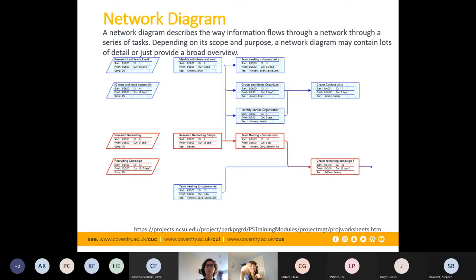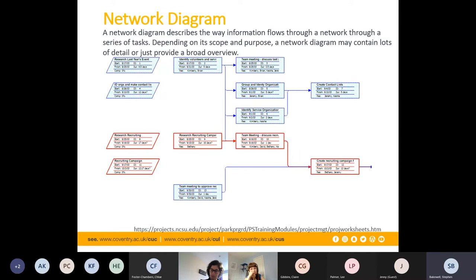Network diagrams tell you where you've got float and where you don't. The pros are the level of detail they provide — as good as the information you put in. The negatives are that they can be extremely complicated on larger projects and require a lot of admin to keep up to date. It's really one of those tools where the more you put in, the more you get out.